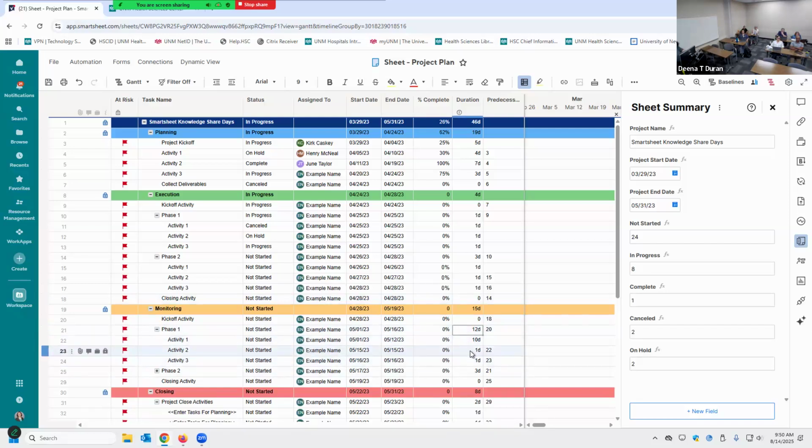And so by changing that, it used to be 1, 2, 3, 1 day things. And so it used to be 3 days. Well, now it's 12 because now it's adding the 10, 1, 1. And that also changed this duration because this row 19 is a grandparent of the one we changed, which in Smartsheet, they don't technically use grandparents as a name, but it's an ancestor. Well, once you get past a parent, you can just call them ancestors.